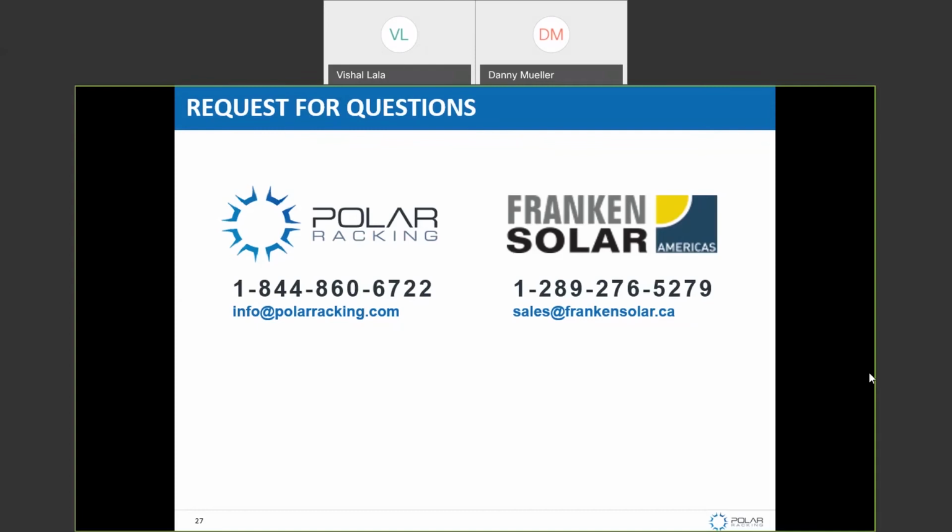But that being said, it really depends on what you're looking for in transitions and what terrain you're working with. If you're working with something flat, like we're seeing out in Alberta, Saskatchewan, your times will be a lot faster. Up in Haliburton County and over rock cliffs, then you're working a lot slower. So that's just the most generic answer I can give for that. And that's already with ground screws in the ground, right? So obviously that is additional time you'd require. Correct.